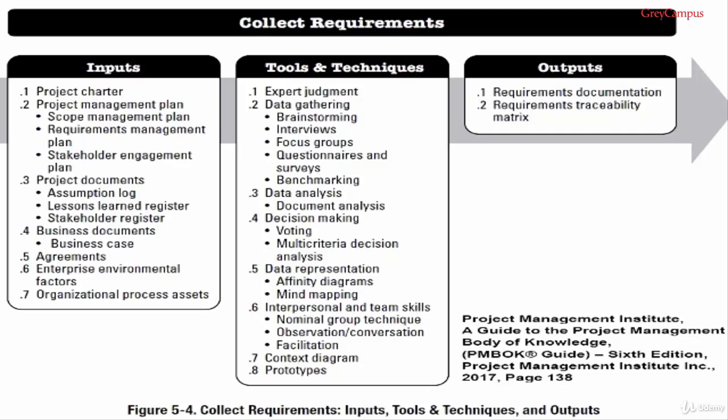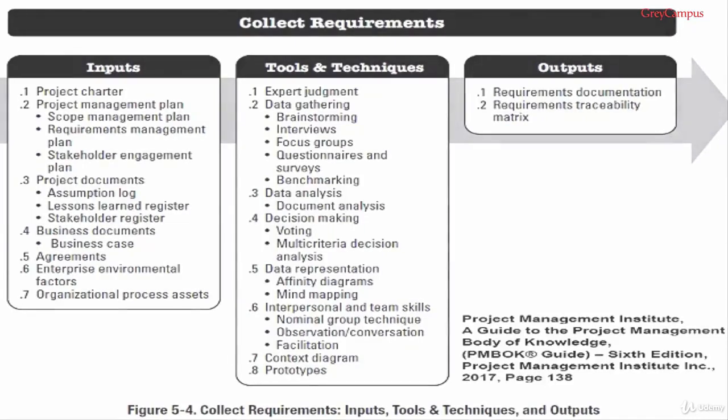and the organizational process assets. So number 6 is enterprise environmental factors, and they would provide us with the organization's culture, its infrastructure, personnel administration and the marketplace conditions. Number 7, organizational process assets, should provide policies we have to obey, procedures we have to follow, historical information and lessons learned from previous projects so we can benefit from past experience and avoid past mistakes.